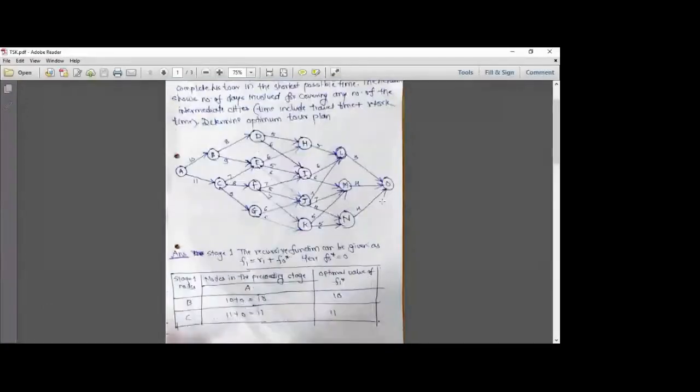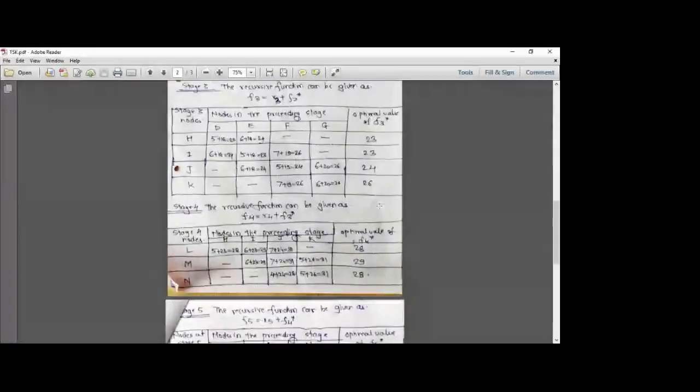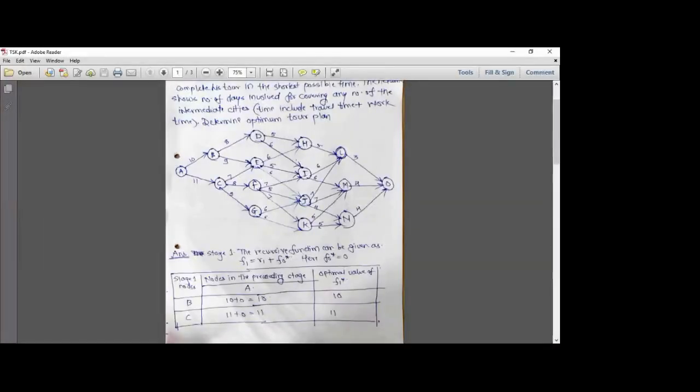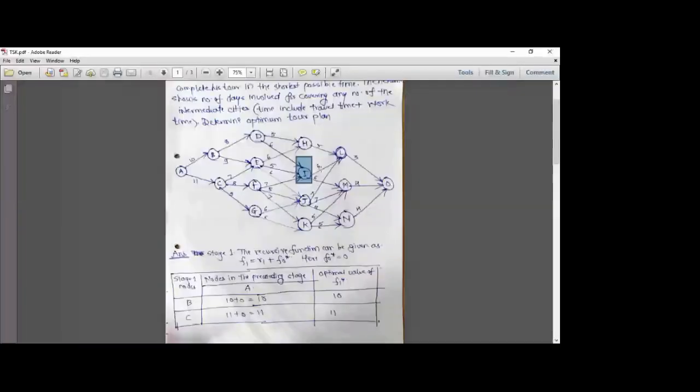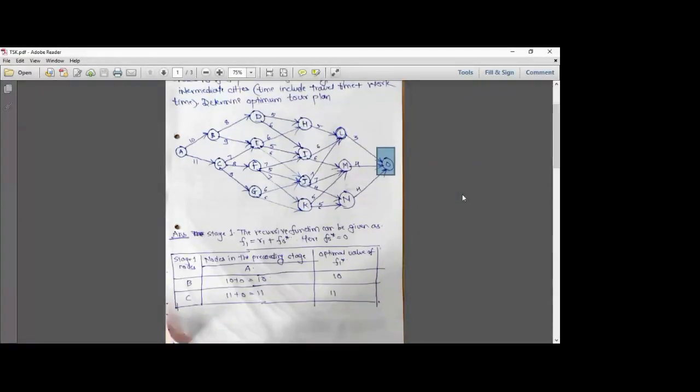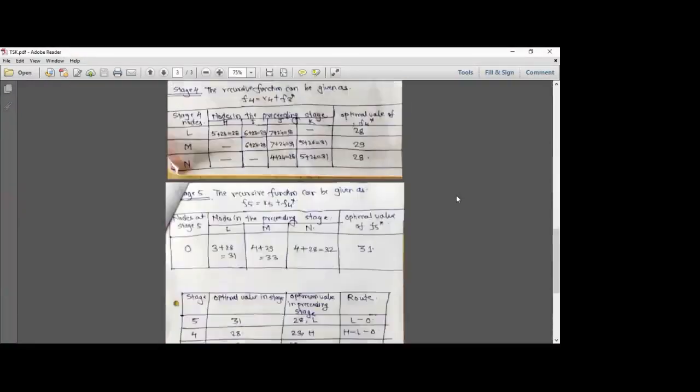Now, let's take another route which is again given by node I. So what node I says is that from I we should go towards L, and from L then we should move towards O. So I has a value of 23. So now 23 plus 6 is 29. So we reach here. 29 plus 3 is 32. So now my ILO route gives me the value of 32.